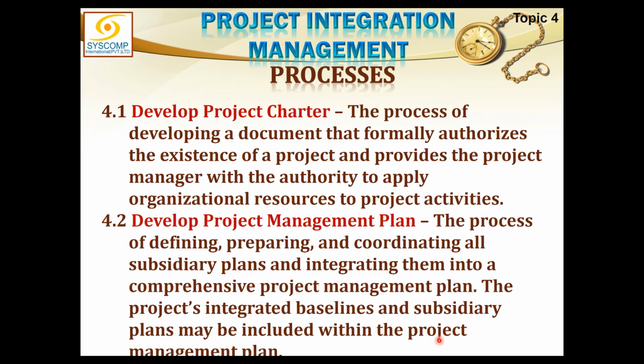Talking about each one of these processes, I will not read out the whole thing, but generally we understand that in developing the charter, this is the responsibility of the sponsor. The project manager can help in the development of the project charter, but the charter is basically the formal authorization, and it recognizes the mere existence of the project.